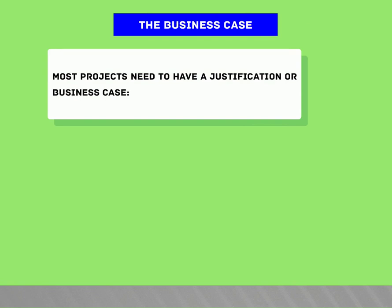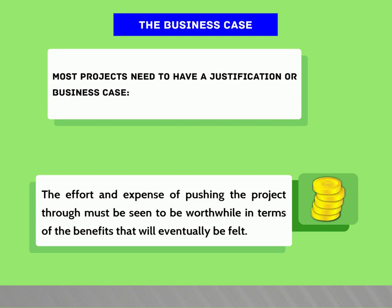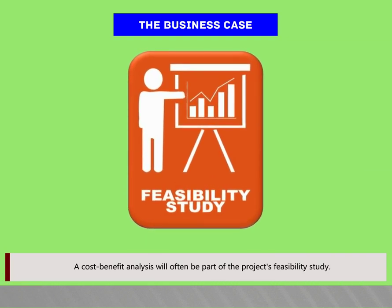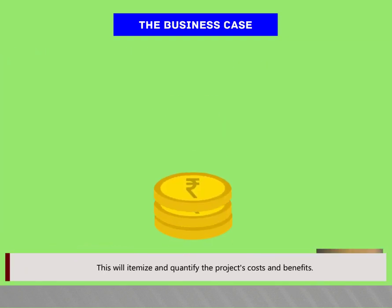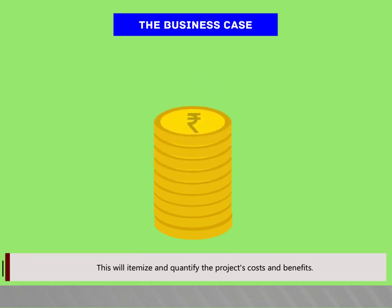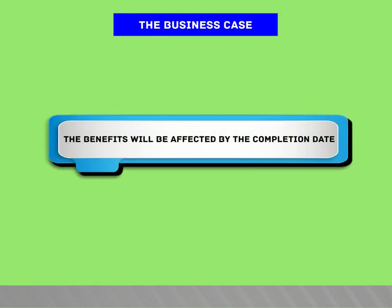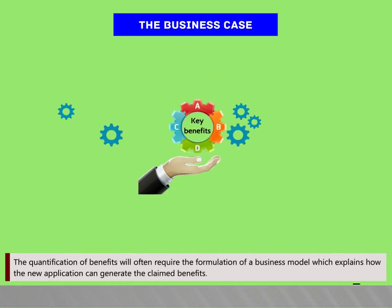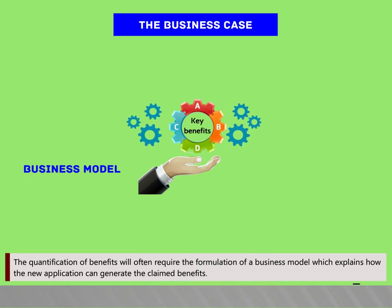Most projects need to have a justification or business case — the effort and expense of the project must be seen to be worthwhile in terms of the benefits that will eventually be felt. A cost-benefit analysis will often be part of the project's feasibility study, itemizing and quantifying the project's costs and benefits. The benefits will be affected by the completion date — the sooner the project is completed, the sooner the benefits can be experienced. The quantification of benefits will often require the formulation of a business model explaining how the new application can generate the claimed benefits.